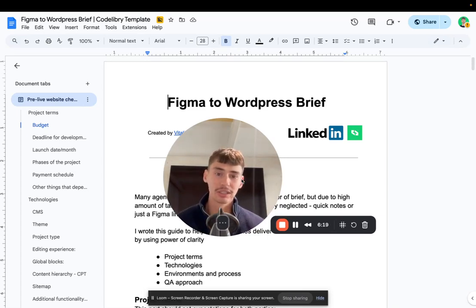Okay, then 100%, any agency owner should include buffers in their project. Buffers are the cornerstone of any project. You literally put buffers on anything. And when you give a deadline to a developer or team, make sure they understand that it's a deadline for them, but it's not the deadline for you. So if you post any website project with a schedule of 1 month to deliver to the client, make sure that in 3 weeks you get everything, because that final week will be spent on tiny back and forth details you need to polish the project.